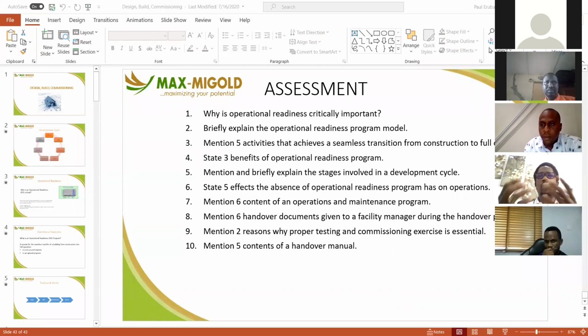You have that, of course, the contract should be enforced. That is straightforward. The contract is clear. If there are certain types of defects within 12 months, developer comes back, right? Now, but what I normally will recommend is that FMs, before you take up a new site, work with developers to have a fund, a percentage of the entire construction should be reserved as a fund for deferred liability. So if they build for 1 billion naira, for example, it should ideally be 5%, but that's not practical. Even if it is 2% or 2.5% of that 1 billion, they put out and say, for the next 12 months, this money is locked in.